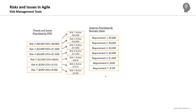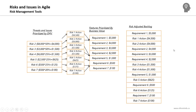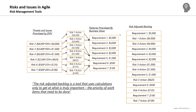Now we have 7 risks and 7 features on the product backlog. Each risk has a response plan — an action needed to deal with that risk, for example costing around $1,500. It's time to prioritize the requirements with the risks to produce a risk-adjusted backlog showing both business features and risk action plans prioritized together. The risk-adjusted backlog is the most commonly used tool for dealing with threats in agile projects.